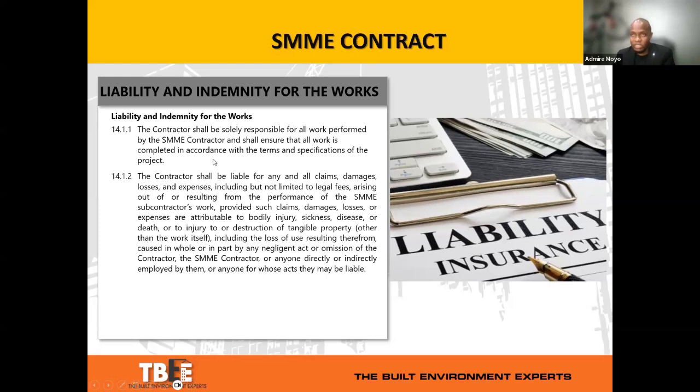Obviously, the work is being undertaken by the SMME contractor as part of a package, but the contractor is solely responsible for all the work performed by the SMME contractor. And the contractor is liable for any claims, damages, losses, and expenses arising from the execution of that work. So that's where it becomes important for the contractor as well to meaningfully participate in that skills transfer process.